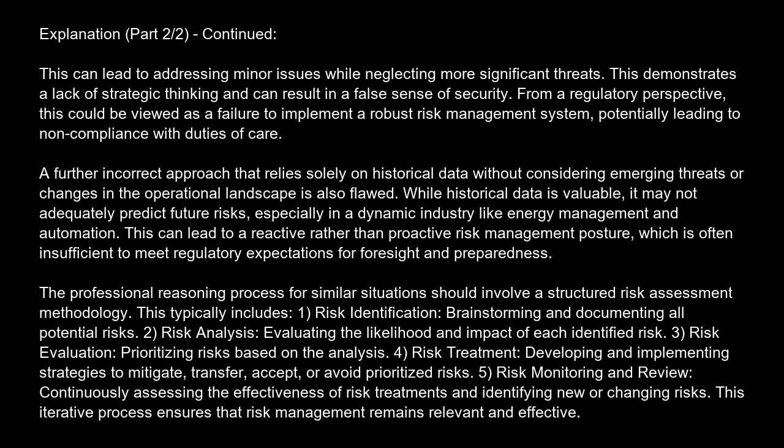4. Risk treatment, developing and implementing strategies to mitigate, transfer, accept, or avoid prioritized risks. 5. Risk monitoring and review, continuously assessing the effectiveness of risk treatments and identifying new or changing risks. This iterative process ensures that risk management remains relevant and effective.